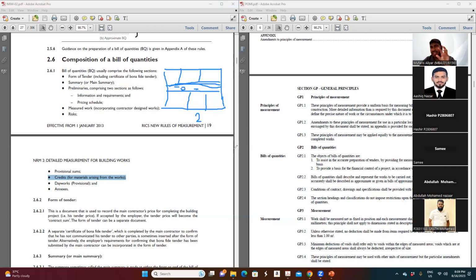No? When he is pricing the tender, he needs to price how much for the demolition, then how much for these items, this equipment, this material, which are client assets. This is the assets of the client. Once he needs to return these assets to the client, or he takes them himself, sells them in the market, and takes the money, he cannot go away with that. He needs to put his profit, and he needs to return the money to the client.